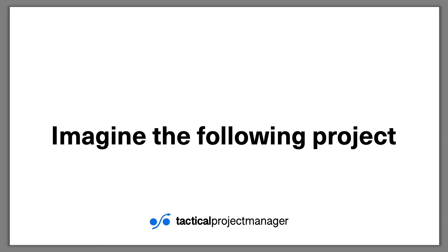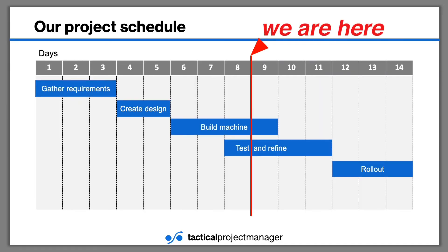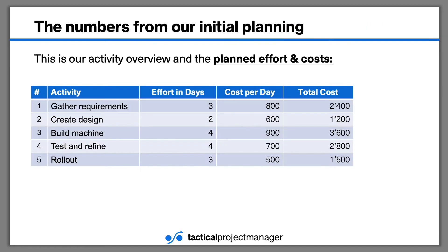Imagine the following project. We are going to build a machine for our client, and we're going to do this in only 14 days. Here's our project schedule. We have five main activities. We have planned three days for gathering requirements, then our engineers spend two days creating the design. Afterwards, we start building the machine, which takes four days. In parallel, our experts can already start testing and refining the machine with the client. And starting at day 12, we roll out the machine, which takes three days.